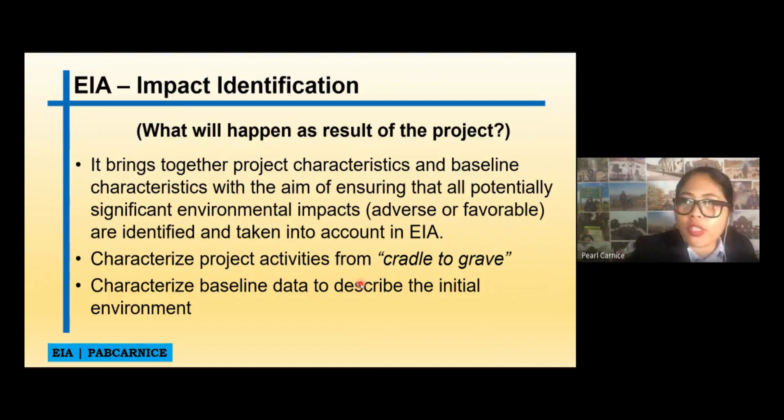And then, of course, characterize project activities from cradle to grave. When you say cradle to grave, from the moment it was not created yet up to its decommissioning or abandonment phase. So from pre-construction to construction to operational to the decommissioning or abandonment phase. We have to consider that with the impact identification. And then, characterize baseline data to describe the initial environment.